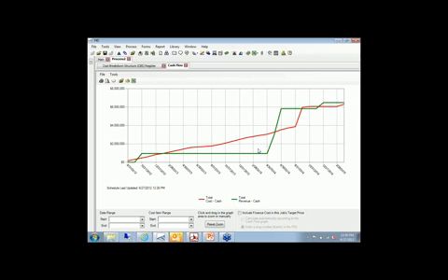Okay, so this is the kind of thing that, in the course of preparing an estimate, preparing a budget, preparing a schedule, you can optimize by looking at, hey, how do we eliminate that period where our revenue is substantially below our costs? We can do that by changing the schedule. We can do that by changing the payment milestones. We can do that by changing our costs, perhaps moving money around in different areas of the project. Right, lots of approaches to deal with that issue. But hard dollar, you can see, is giving you visibility to it, and as we address the issue, we'll see it very clearly.